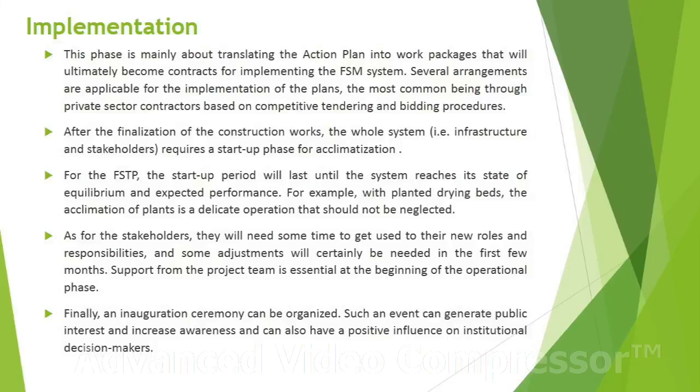This phase is mainly about translating the action plan into work packages that will ultimately become contracts for implementing the FSM system. Several arrangements are applicable for the implementation of the plans, the most common being through private sector contractors based on competitive tendering and bidding procedure.